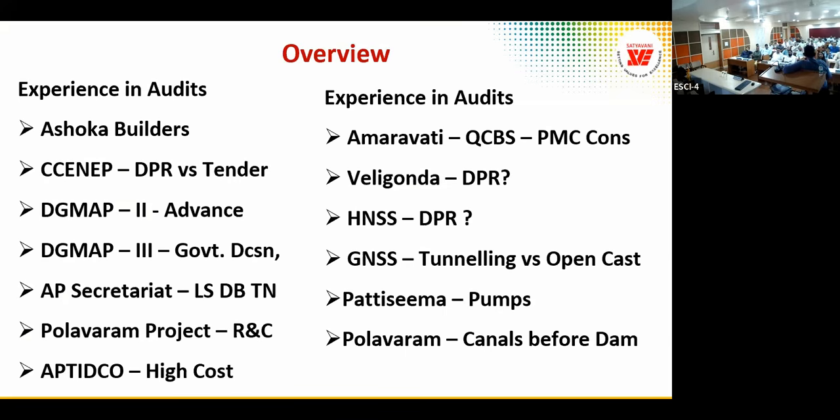We have 2 ways of transporting the material to such sites. One is by elephant back, headloads, or airlift. We did both methods of costing to arrive at the project cost. If we had done that project in Hyderabad, let us say, it would have cost 60 crores. And this lift or lead cost has come to 100 crores. So the total cost we gave was 160 crores.